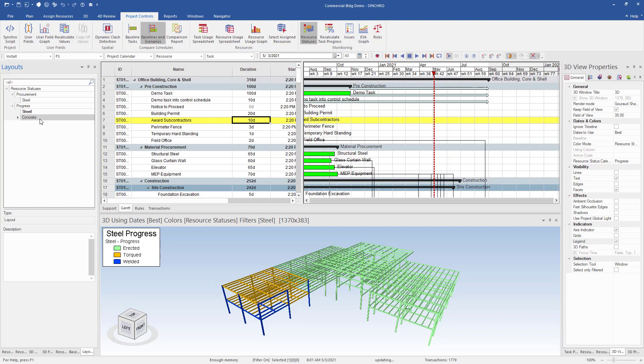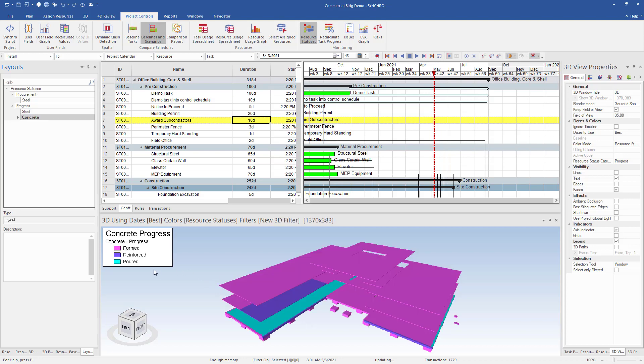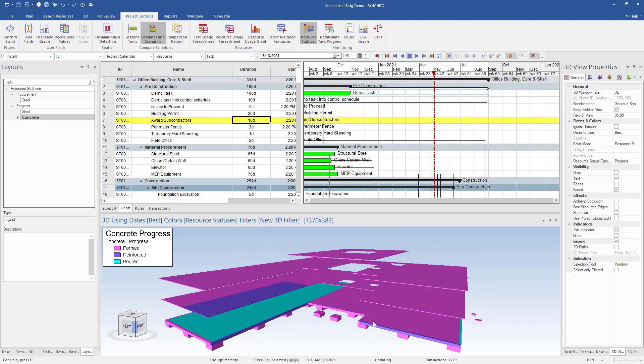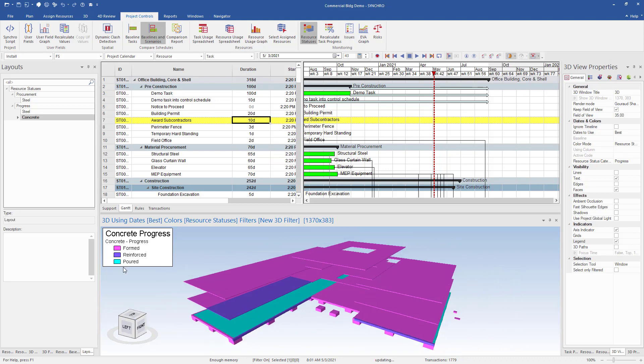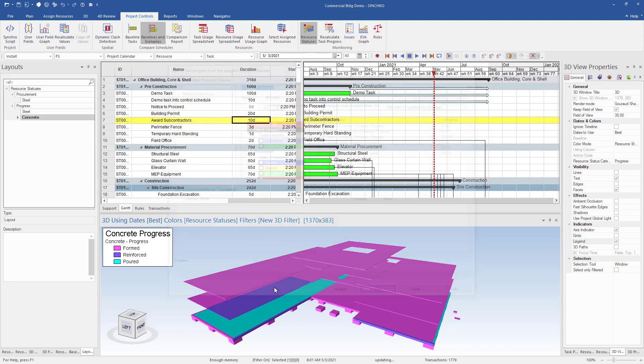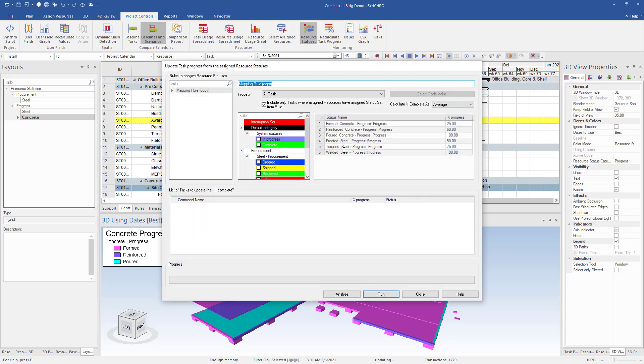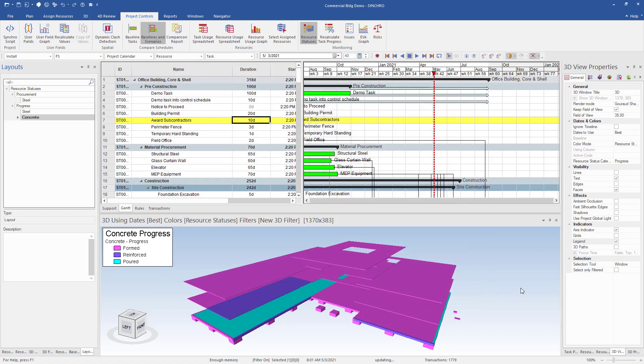Now we can jump to the steel progress and we have the green as erected, orange as torqued, and blue as welded. And for concrete, we have formed, reinforced, and poured color coded as well. We can easily see just by looking at the model what status they are and the progress that has been made on our project. We can even set up our percentage progress for our resource statuses. So anything that is formed status will have a percent complete of 25%, reinforced 60%, and poured 100%.